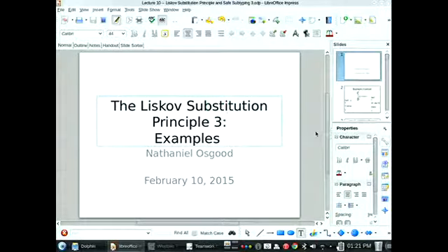What does that mean, the critical path? It's the limiting path. Let's expound on that some more. That means that it doesn't really help to increase the efficiency of the non-critical path. Any delay in the critical path will delay the whole project. If you delay the critical path, you're directly delaying the finish of the whole project. Let's suppose I were to delay T2 by an hour. Is that a problem? No. I have slack with that. I have give. I have latitude. I have float. It goes by different terms.